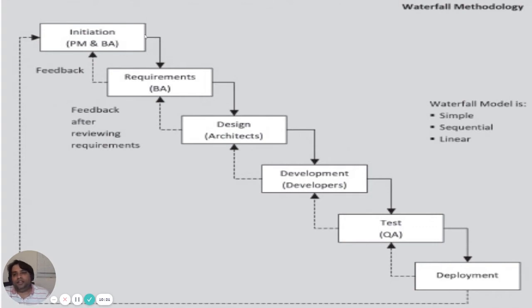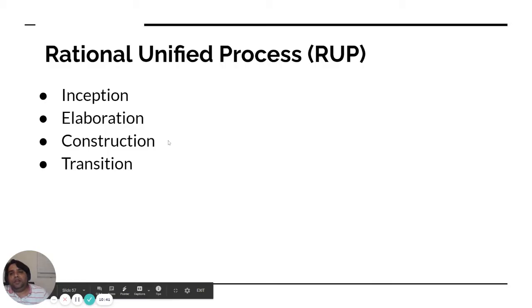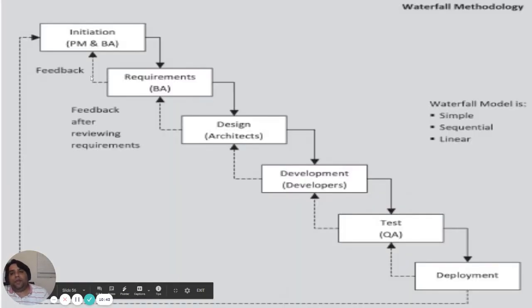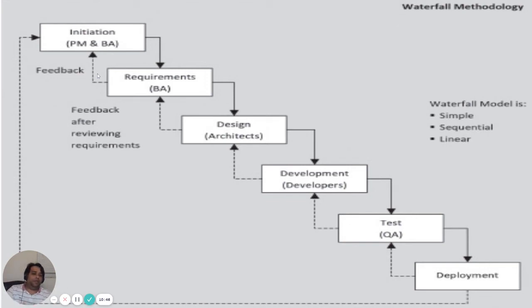Unless and until initialization is complete, you cannot start requirement. Once requirement is complete, then you can start on designing. Design is complete, develop. So that is the basic idea behind that. And there is a feedback path as well for each of the things. At the end of the phase, you will have a review and you will have the feedback of all.